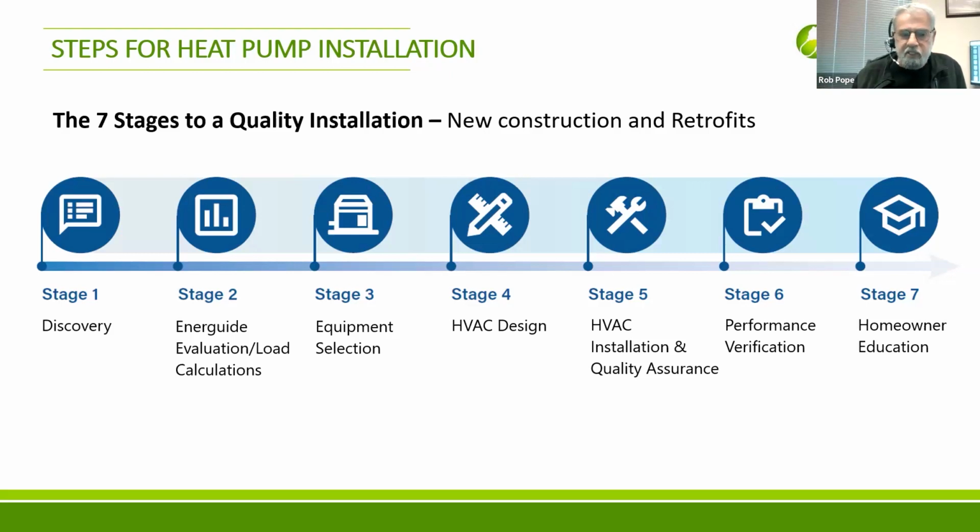First is discovery, stage 1. That's when you find out what's important, budgets, that kind of stuff. Stage 2, you need to do some analysis, so an energy evaluation is pretty critical, which will include a load calculation, a block load in an existing home. That's all you need. But if it's a new construction, you need load calculations done. Then there's an equipment selection process, cost of the equipment and the technology that's most appropriate for the project, and so on. Then you want to design.